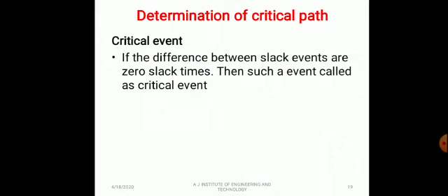In other words, critical activities are those which control the minimum possible duration within which a project is expected to be completed. It is also the activity for which the value of the total float is 0. In fact, when total float is 0, all other float values are also 0.